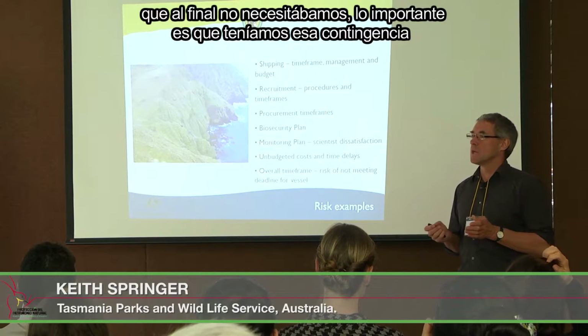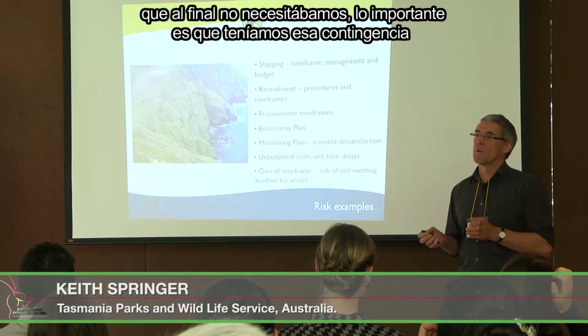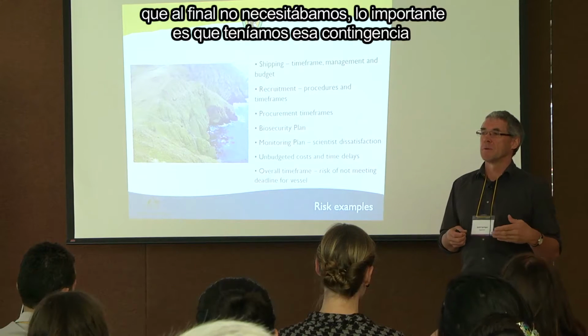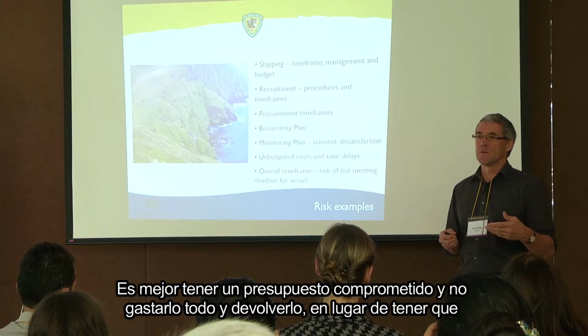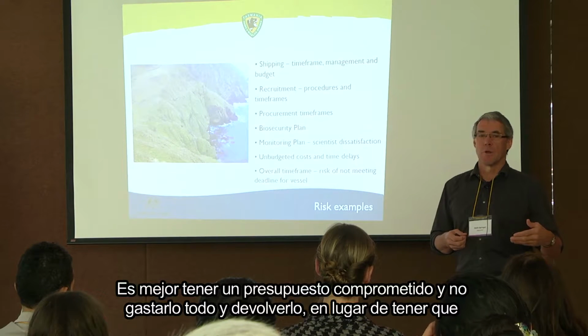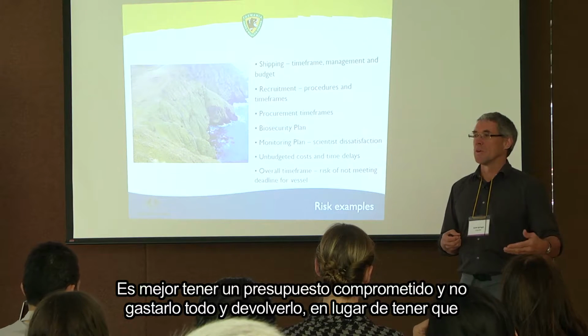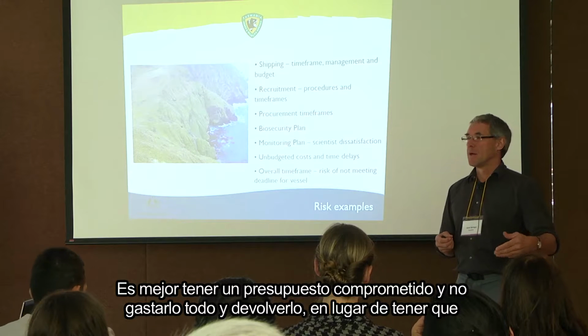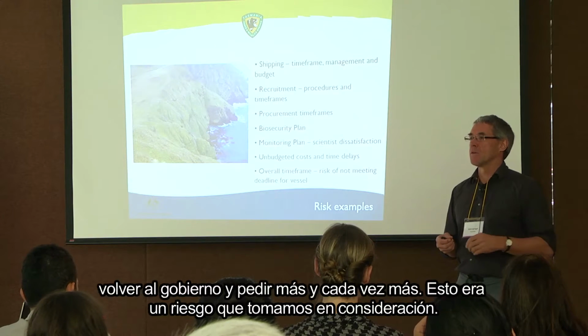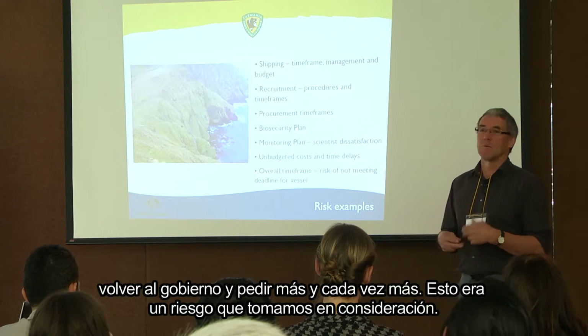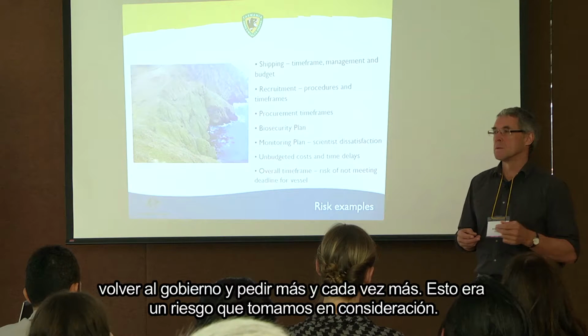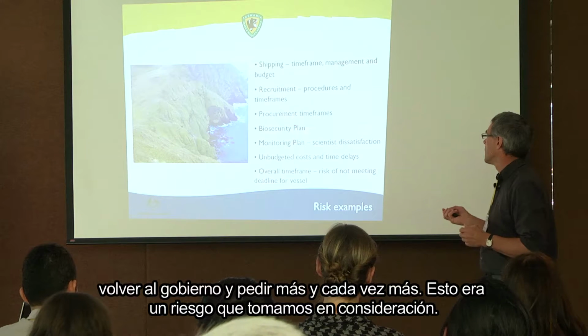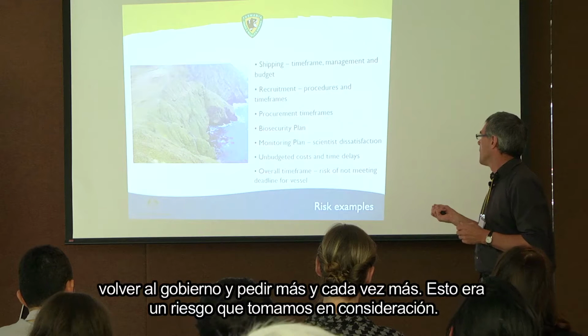And in the end, we didn't need it. But the important thing was that we had it there if we did need it. And it's always easier to have the budget there committed and not spend it all and give it back, than it is to go back to government and say, we need more, we need more, we need more. So that was another risk that we looked at.